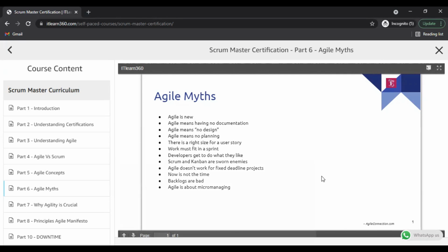A user story can range from a simple task to large, complicated modules of functionality that can be divided into various subtasks. The larger stories are usually called epics, and these need to be broken down into smaller pieces before the development team can fit them into a sprint.